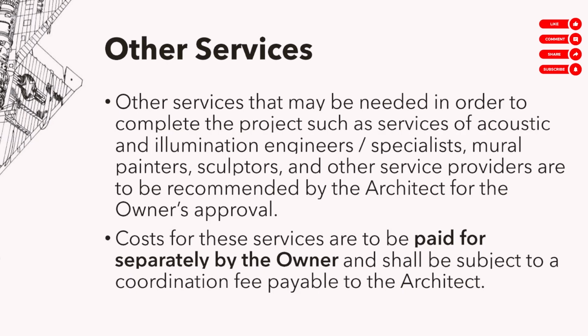Other services may be needed to complete the project, such as services of acoustic engineers, illumination specialists, mural painters, sculptors, etc. This may be needed for some projects. All we're saying is if they're needed, they will be recommended by the architect for the approval of the owner, and these are to be paid for separately by the owner. In fact, the architect should collect an additional coordination fee.